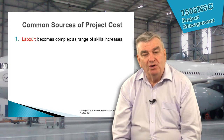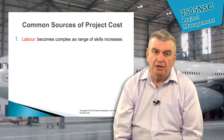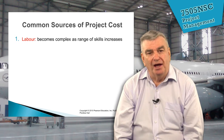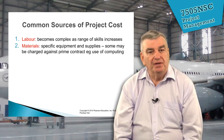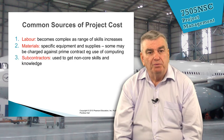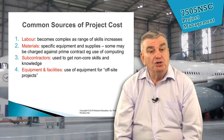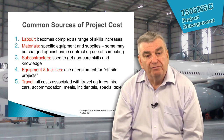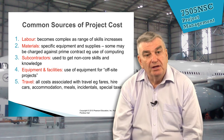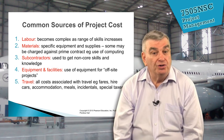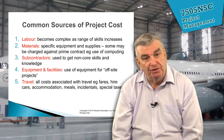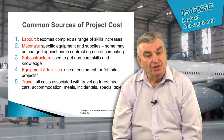What are the common sources of project costs? I always say, when you're thinking about projects, think of building a house. Obviously, labour. Then, of course, materials. This includes specific equipment and supplies, the subcontractors you bring in, the equipment and facilities you might need, and travel. Those are the five categories of sources of cost. They're what you encounter when you build a house, but they're exactly the same ones you get when you build an Airbus A350 or a Boeing 787.